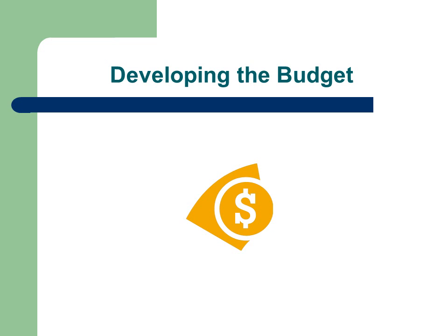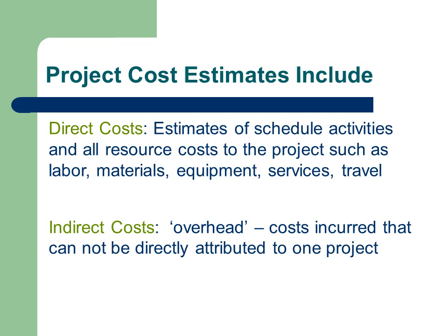Once we have a clear picture of the work effort and resources required to do each activity of each work package in the project, we are able to estimate the cost of the project. For most projects, the major cost is human resources. Other costs which must also be considered are equipment, material, and extra costs such as travel. These are all direct costs. That means they are costs which are directly attributable to the project.